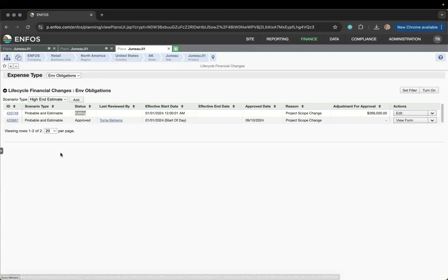You also cannot predate effective dates. So my effective date is January 1st, and then again, January 1st, 1 second later. I cannot import a probable and estimable plan for 2023. I'm going to get an error. You can only import from January 1st and forward.